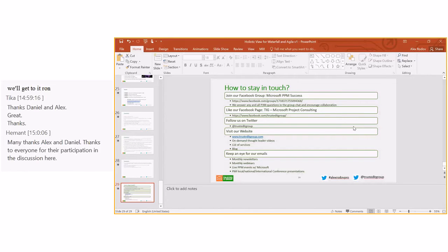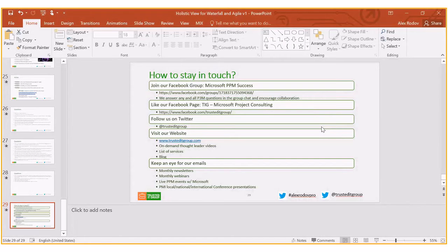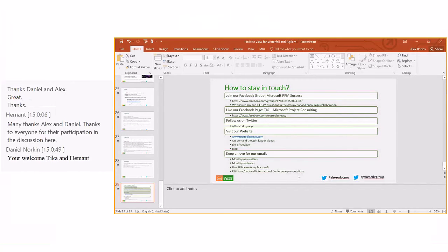Yeah, so for budgeting at the project level, you would need to understand what teams are going to be involved in this project, and by knowing how many teams are going to be involved, you would be able to bring in the SMEs that will give you these numbers for your budget.